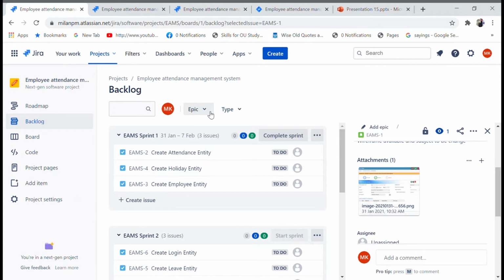An epic is a wider range of details, and if we break it down into some tasks, subtasks, or bugs, and link them with the epic we want to work with, then our feature will be related to that ticket. So it will be easy for us to track which features are really needed and which features have been done. It's a process of filtering the tickets, and it will be easy for a PM and other people involved to see the report.